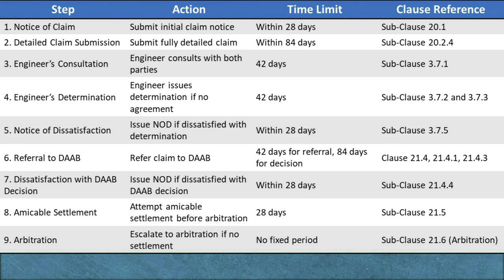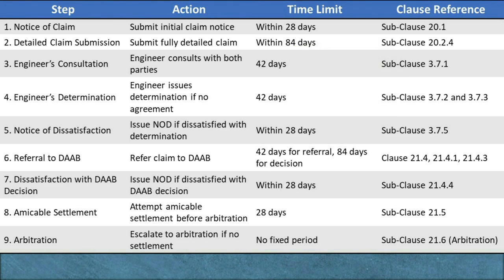Alternatively, the parties may agree to a different timeframe for this consultation. This consultation phase provides an opportunity for open dialogue and encourages the engineer to mediate between the parties to reach a settlement without requiring a formal determination. It promotes early dispute resolution and can help prevent escalation.